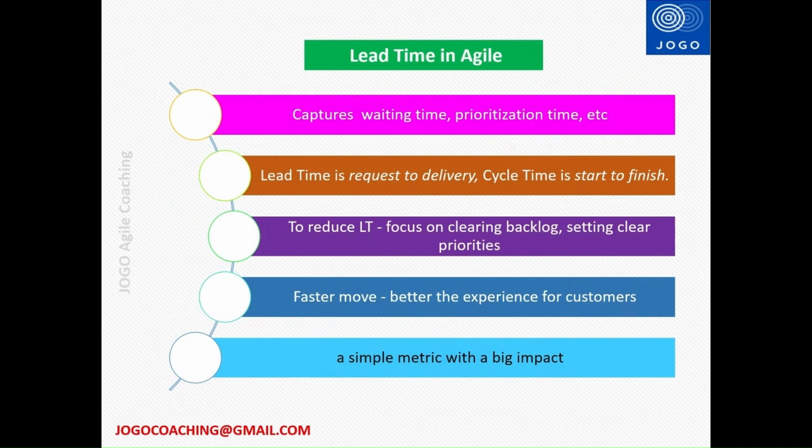Here is the key difference. Lead time is from the request stage to the delivery stage, and cycle time is from the start date to the finish date. Lead time includes the waiting time before the team starts the work.